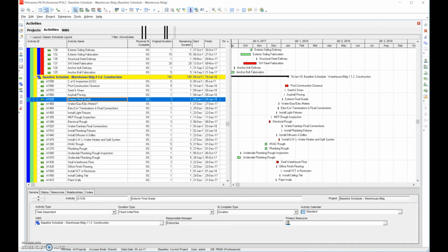One thing I want to talk to you about is spelling, capitalization, and format: verb, noun, quantifiable. Consistency is important. When you do not provide consistency in the schedule, you make it easy for the reviewer to drill deeper. If they see an obvious misspelling, they will drill deeper into your schedule. So if you want to get a schedule approved the first time, the best thing you can do is make sure everything is spelled correctly.